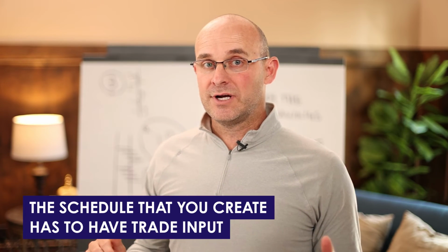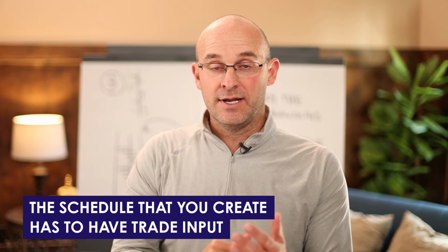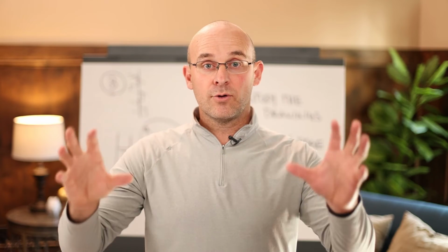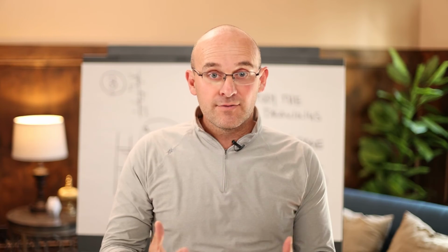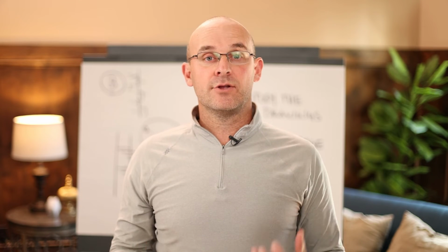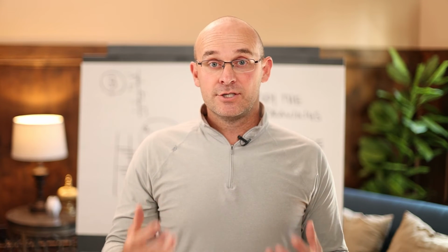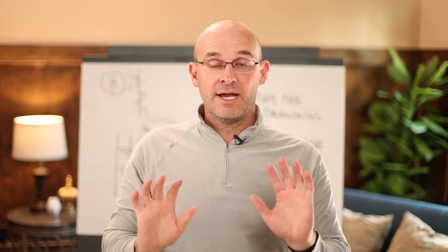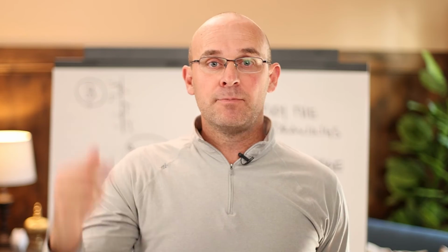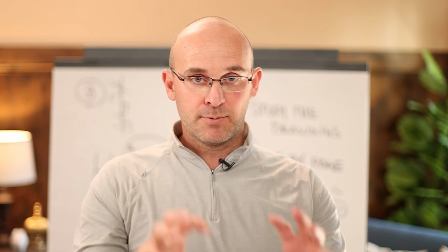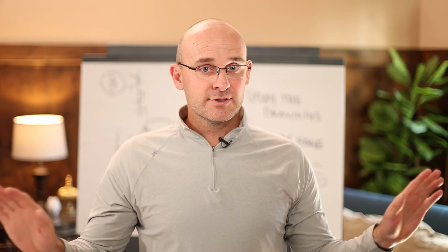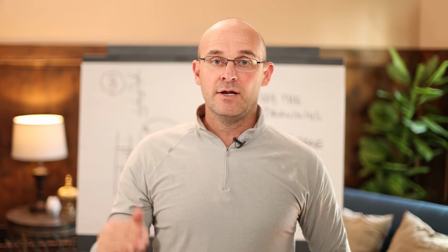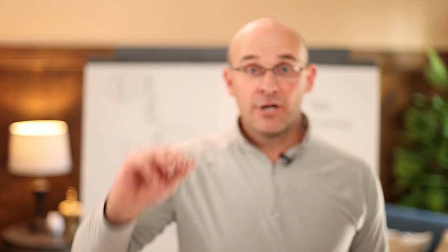This schedule that you create has to have trade input. They are the experts. They are the builders. You are the planner, scheduler, coordinator, executor. You are the leader of the project, but we must rely on the crew leaders, the trade partners on the project, to do the building, and therefore we have to involve, get the wisdom from, and communicate and collaborate with the people that are closest to the field and to the product that's being installed. So your master schedule, your look-ahead schedule, your weekly work plan must have trade involvement according to the last planner system. And I'll leave you with 3 keys.